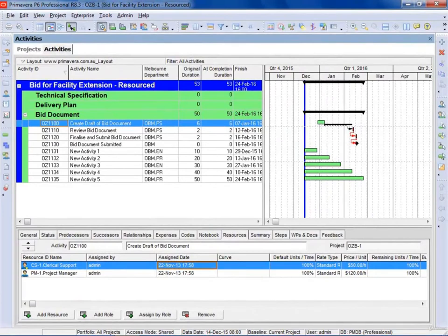In my book, I've got notes and/or restrictions on import, and I've covered all of those in my demonstration. I'm suggesting that you create a test project before you start and just practice on a test project before you mess up a live project. So export some data with the column headings, add or change them, and import them. Before you want to import into a live project, take a copy of it, Control-C, Control-V, take a backup copy in case you mess it up.